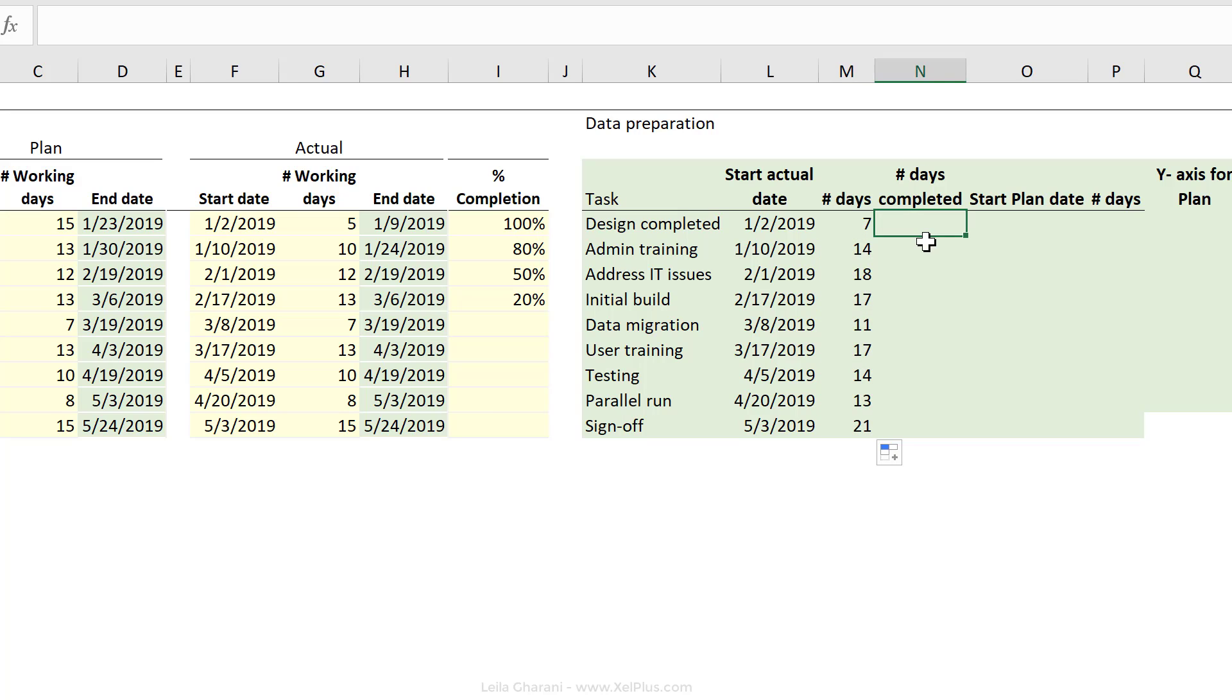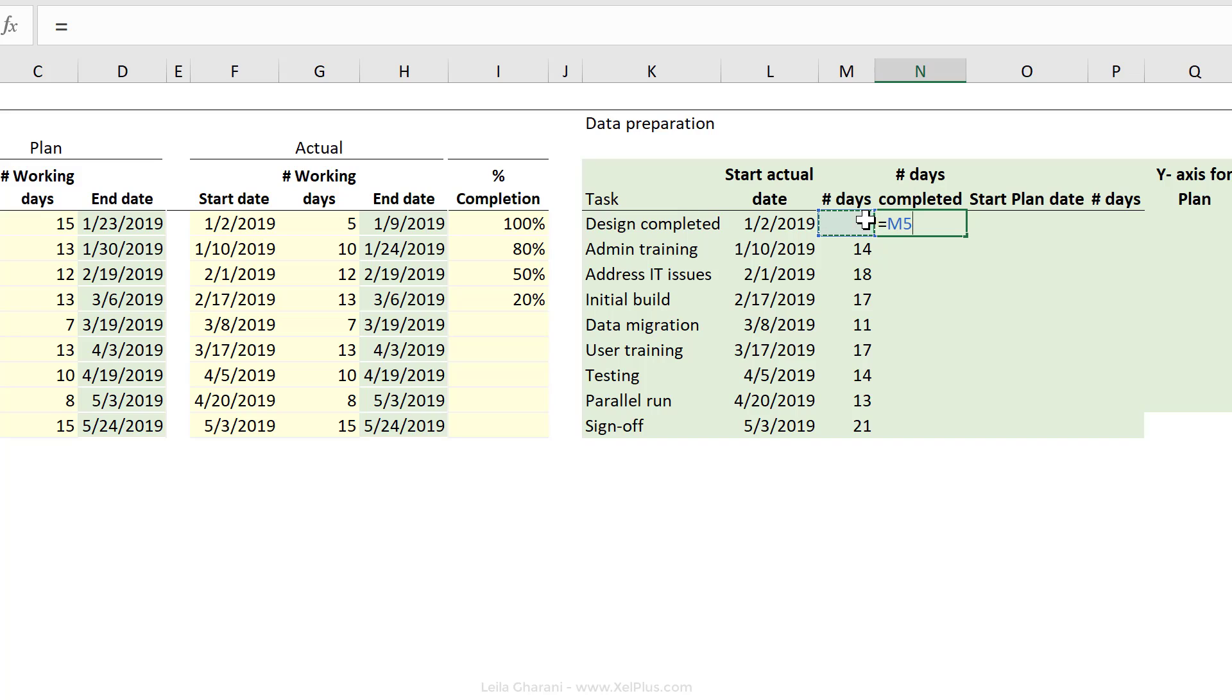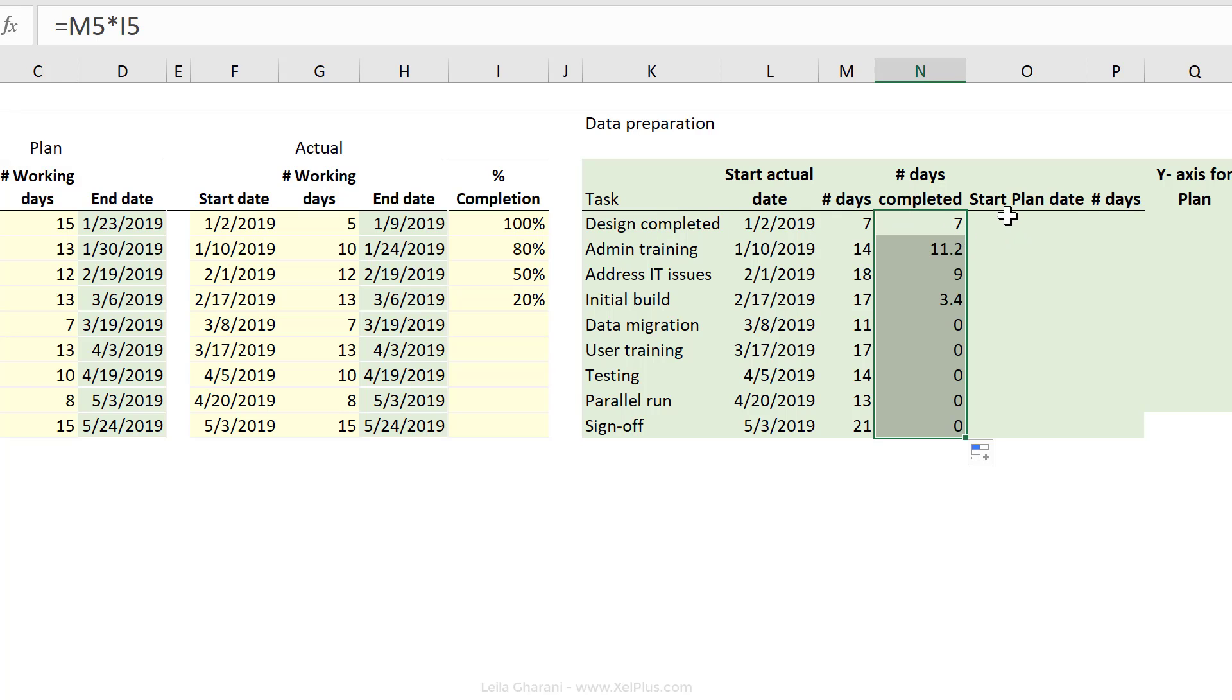The number of days completed. For this, if I have 100%, I want to show the full number of days here. So that's just a basic calculation. I'm going to take the number of days and multiply it with this percentage and send this down.